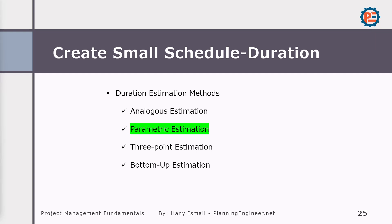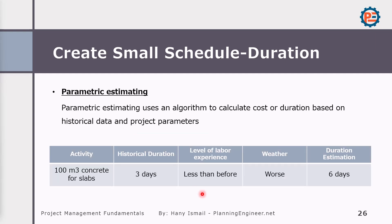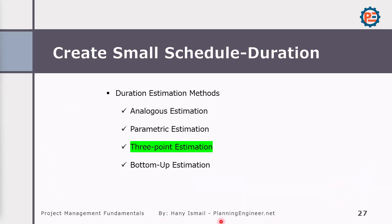The other method is parametric estimation, which uses an algorithm to calculate cost or duration based on historical data and project parameters. For example, 100 cubic meters of concrete for slabs takes three days, but this project has a special condition — the labor experience level is lower and the weather is worse — so the duration estimation becomes six days instead of three.